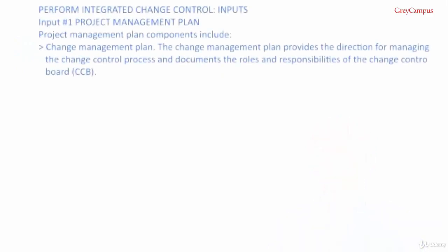Perform integrated change control inputs. Number 1, project management plan. The project management plan components which we might need are the change management plan. The change management plan provides the direction for managing the change control process and documents the role and responsibilities of the change control board, the CCB.